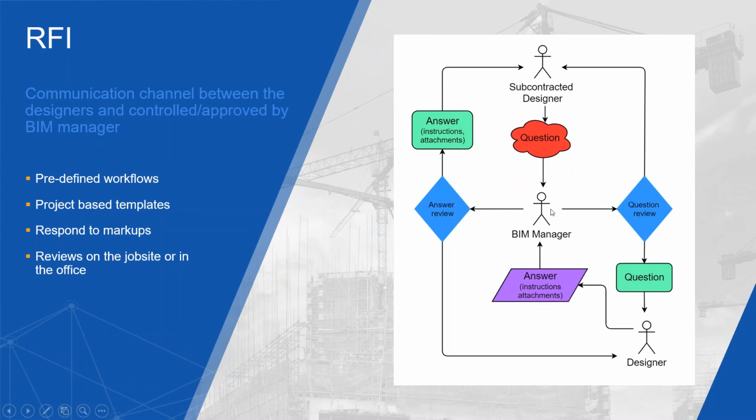You can imagine the BIM manager as a kind of hub for questions. He will review the question, and if he doesn't understand or doesn't agree, he can send it back to the contractor. If everything is fine, the question is submitted to the designer.